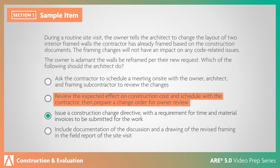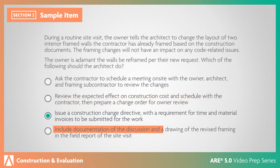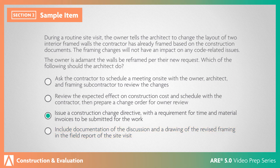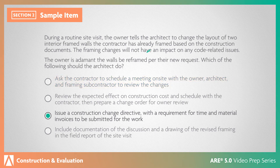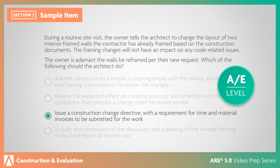Reviewing the expected cost ahead of completing the work is unnecessary in this situation. On the other hand, a field report alone is inadequate because this change certainly has both time and cost impacts. Finally, an on-site meeting with the sub is unnecessary as the requested changes can be fully documented by the architect. This is an AE-level item requiring an assessment of a built condition in order to determine the appropriate contract change.